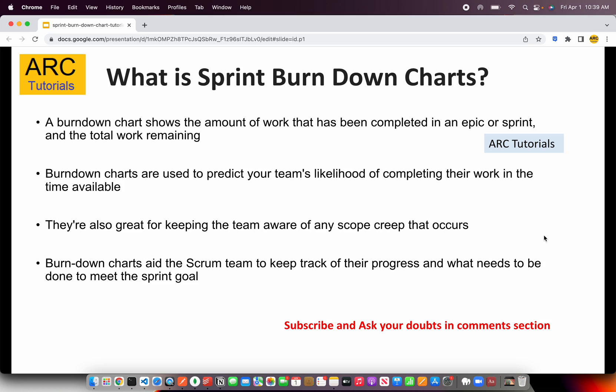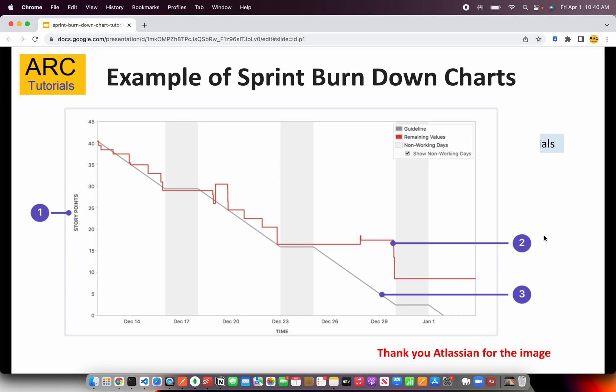These are the theoretical explanations, but mostly people are confused when they look at the chart. So let's take a look at the chart and try to understand it in more detail. Now remember, the sprint burndown chart will always look like this. You have a diagonal line — the gray color line that you see is a guideline which represents the ideal way to close a particular sprint. The red color line shows how your sprint is progressing and how your stories are getting closed.